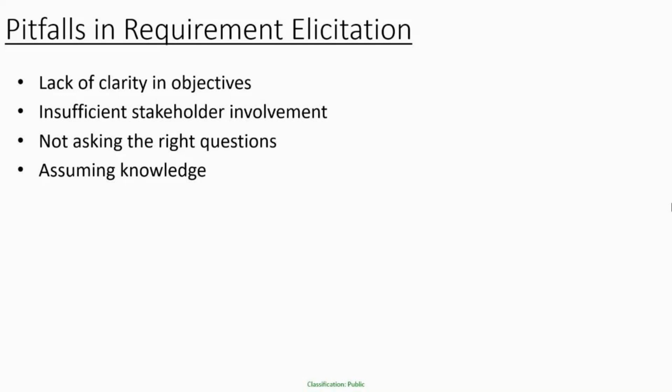For example, if today a requirement has been given, and all of a sudden they come up with a change in that requirement, you should make them aware that there's a change management process wherein they have to give that change, you have to consider it, analyze it, maybe take it to the tech lead, look into the efforts required, and then see if it is supposed to be prioritized right now, or can we do away with it for now and take it up at a later release.